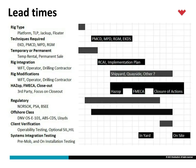Whether it's a jackup or a floater, if the rig carries class, it all has to be done. But on a floater, it's more difficult to get the equipment spotted and to route the piping. With the day rates they command, there's a lot of hesitation to take them out of service. There have been some installations done in situ — spending six months installing pipework one at a time, testing one at a time — because rigs don't want to be taken out of service. Now there are a lot of rigs out of service, so we're trying to figure out exactly what needs to be done, how long it will take, and tighten up these lead times for rigs that are currently parked, uncontracted, or that will be doing five-year SPS.